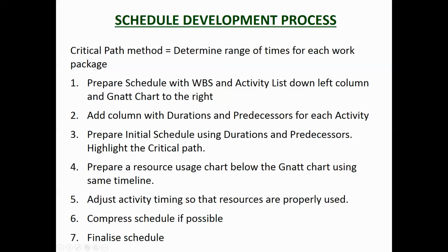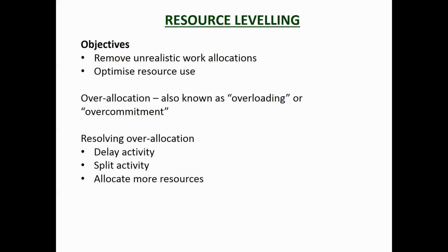So let's look at that resource leveling in a little bit more detail. Resource leveling is removing unrealistic work allocations. In other words, you can't expect an excavator driver to be doing 2 things at once. So you can't say he's going to be spending a whole day on earthworks and at the same time he's going to be spending a whole day on digging a trench. It might be that he can spend half of his time on the earthworks and half of his time on digging the trench. So you can say 50% for each one, but you can't say 100% of his time is allocated to the earthworks and 100% of his time is allocated to the drainage work.